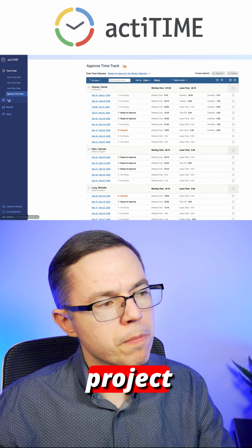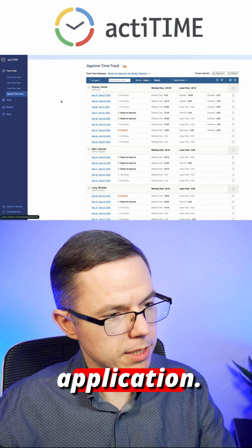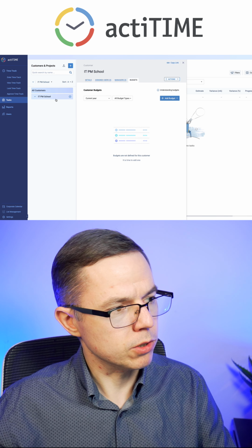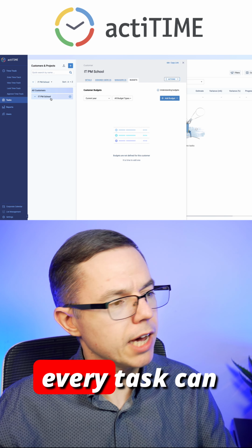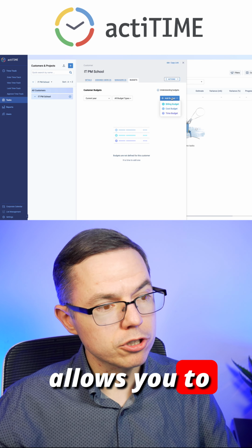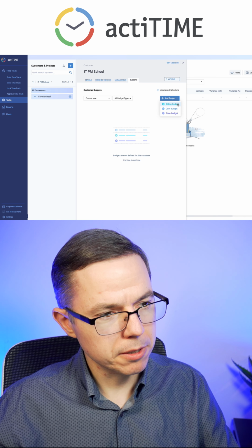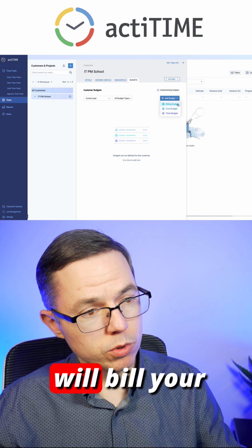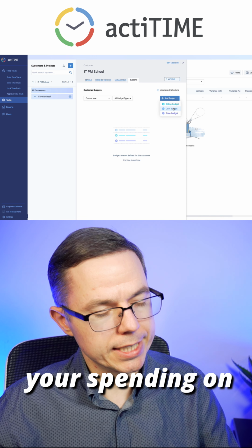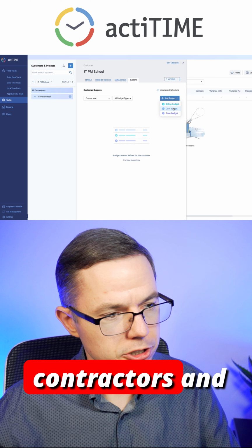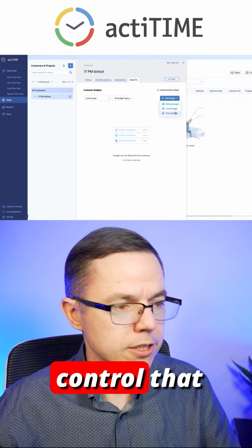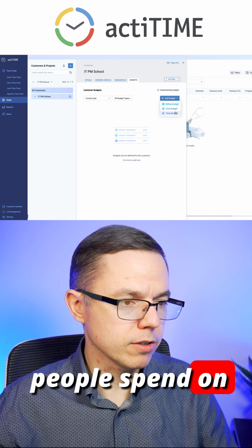Alright, let's move on to the project management side of this application. First of all, there is a very smart feature here. Every project and basically every task can have a budget. actiTIME allows you to differentiate between billing budget, so the budget that you will bill your customers, the cost budget, which is your spending on freelancers and contractors, and time budget, the amount of time you may want to control that people spend on specific tasks.